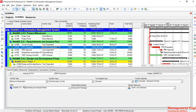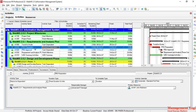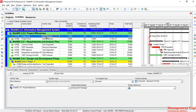On the other hand, if I choose resource dependent, the resource dependent activity will be dependent on the resource calendar, not the activity calendar. When I go to the resources, we have two resources assigned, and each of these resources will have their individual calendars. The resource dependent activity will be dependent on those resource calendars.